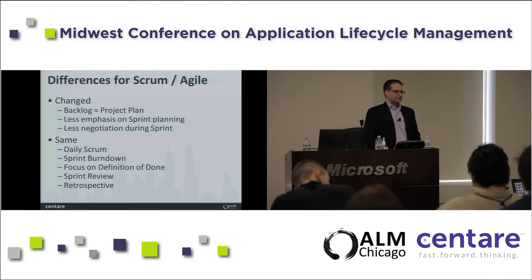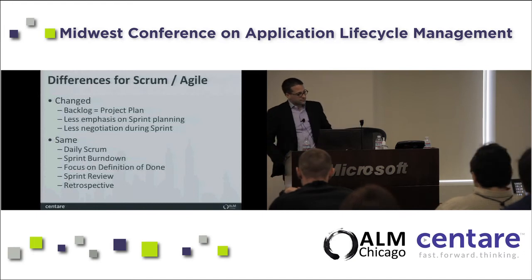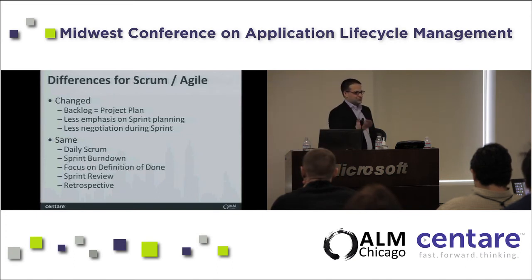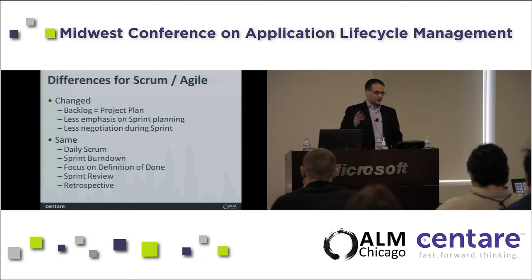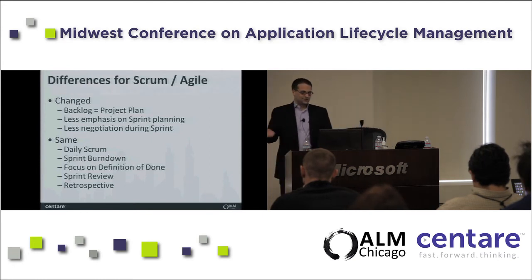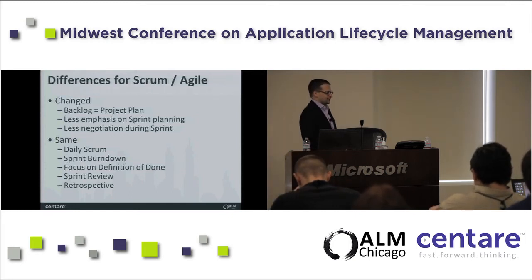Yeah, because the other part of Scrum, or Agile, is that those features may not get in anyway. That's a really good point. So they get moved to the next iteration for whatever reason, that's the hallmark of Agile. But additionally, you could have those PBIs that you forecast you would do but didn't deliver, and when you go into sprint planning for the next sprint, there's no guarantee that those are going to be high priority. They could fall off the planet. Or you move other stuff in. It's the nature of it.